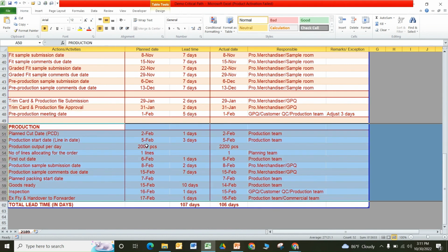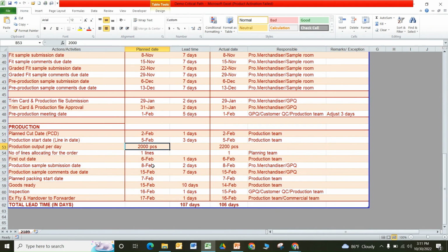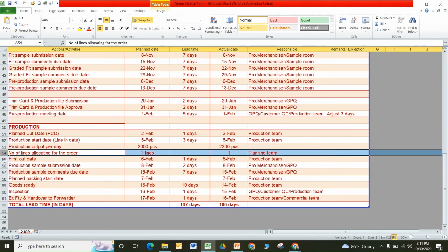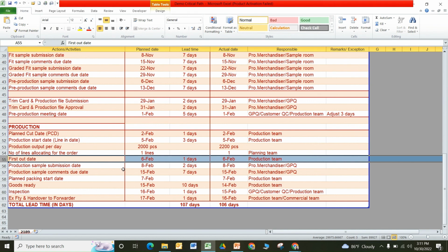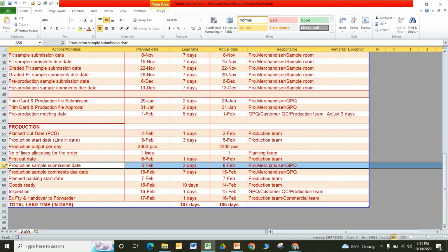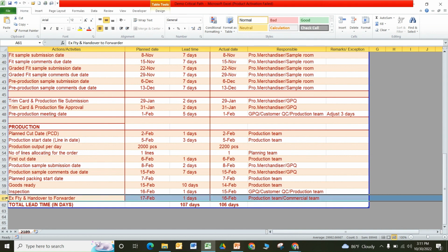After that, the production lead time will be calculated here. So I have taken here production output per day is 2000 pieces. Number of lines allocated for this order, one line only. First out date on 6th of February. So from here you need to submit the production sample. Once it is approved, you can offer inspection and export the goods. Okay. So I will give this format in the description box. You can see in details.